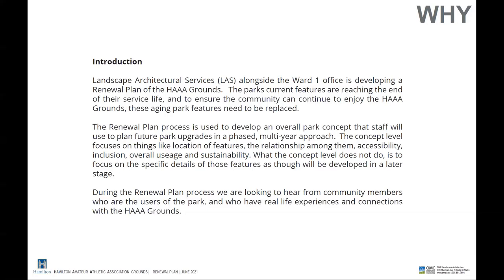The Renewal Plan process is used to develop an overall park concept that staff will use to plan future park upgrades in a phased multi-year approach. The concept level focuses on things like location of features, the relationship among them, accessibility, inclusion, overall usage, and sustainability within the park. What the concept level does not do is focus on the specific details and nitty-gritty information on those amenities. We'll look at that later in the process, but for now we're really putting together a conceptual plan that gives us a vision to follow.